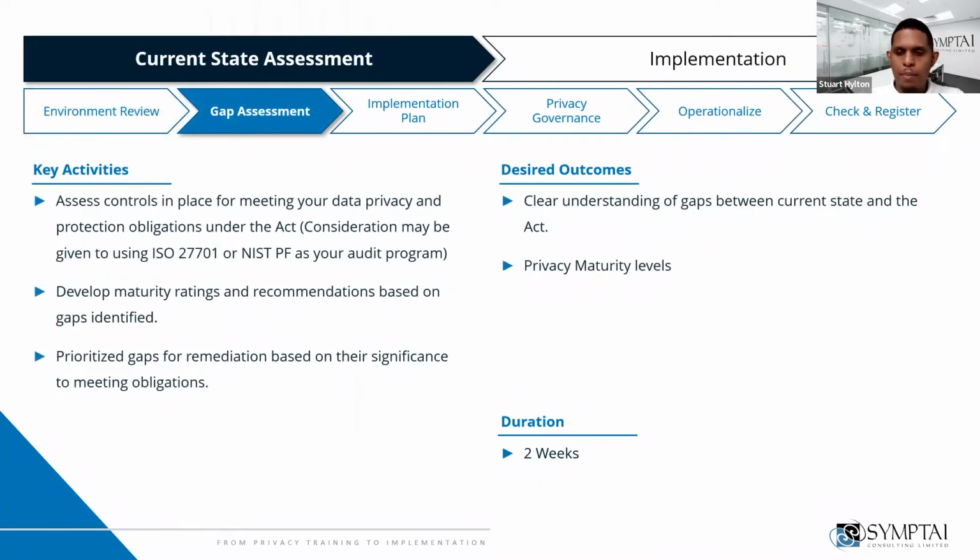Then we go on to do a gap assessment. Oh, and apologies, the previous screen, we estimate about 2 weeks for that first point, and that of course may vary depending on how much time you can dedicate. But if you're a resource that is leading on this effort, then you may estimate 2 full weeks of trying to get through that process, because we need time, of course, to schedule meetings and have discussions and go through the documentation with the personnel responsible for doing a lot of these things.